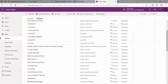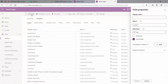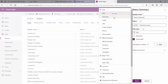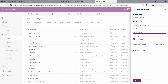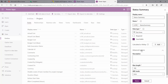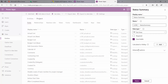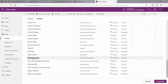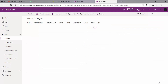I'm going to confirm I'm in my project section and click on Add Fields. The first field we're going to create is the big text box for status summary. I'll name it Status Summary. The system-generated name has a prefix and no spaces, so we'll leave that alone. I'm going to change the data type to Text Area, because Text is just a single line and Text Area gives you a larger box to put in more information. Once done, I'll click Done, scroll down to find my new field, and click Save Entity.